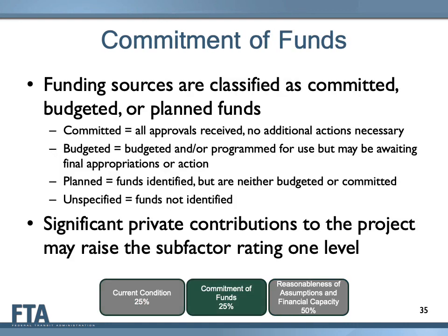For the commitment of funds subfactor, FTA considers the percentage of funds, both capital and operating, that are committed or budgeted versus those only planned or unspecified. Funds are considered committed if sources have all the necessary approvals to be used to fund the proposed project without any additional actions. Funds are budgeted if sources have been budgeted and or programmed for use on the proposed project but are not yet fully committed, meaning the funds have not yet received legislative approval.